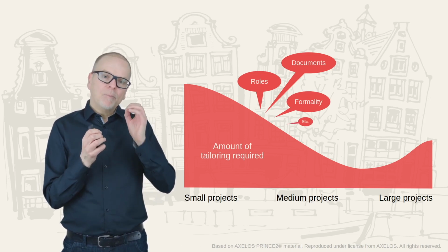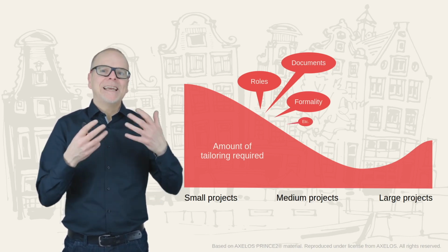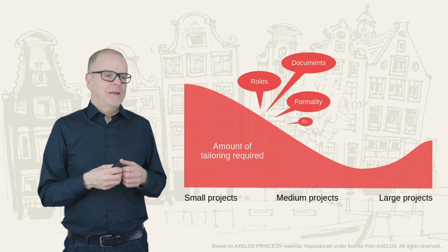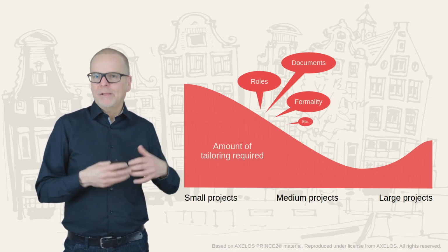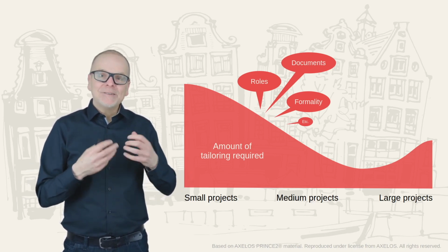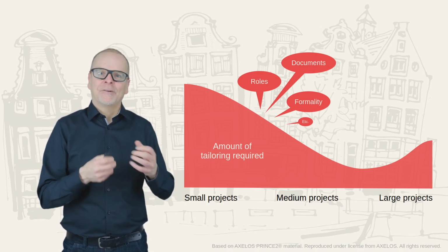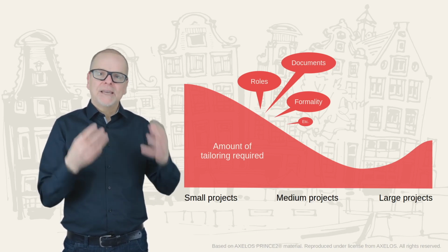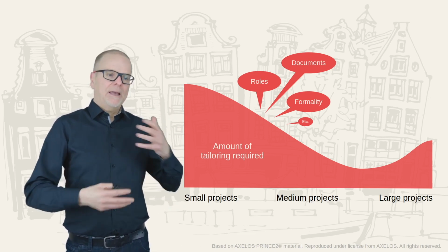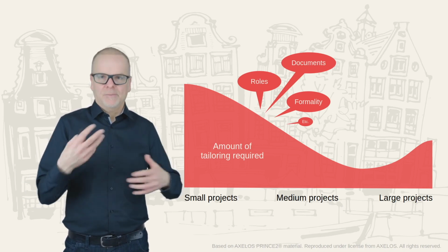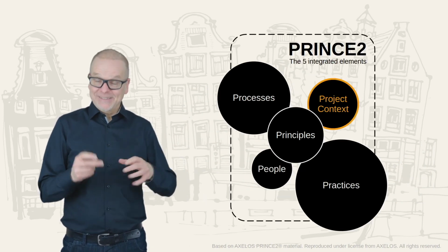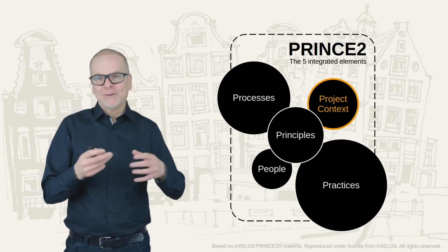Now, the smaller the project is, the more tailoring is required. And there's a small issue here, because usually people beginning with project management are running the small projects. So they don't have the knowledge or expertise to do that, which is a pity. That's why they find it harder to tailor PRINCE2 to suit their project, and they end up having too much documentation or too much formality in the project, and it's not needed. All right, I think I've covered it quite a bit here. So that's it for projects in context and project environment.